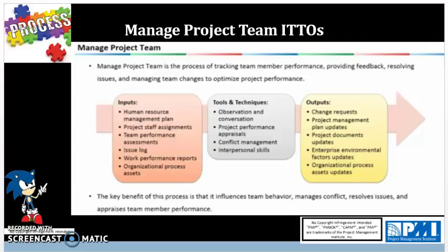So keep in mind that a risk that has not been escalated tends to become an issue. So when we identify risks in risk planning, we need to document them in the risk register and not gloss over risk planning, because if you don't document the risk in the initial phases of risk planning, you will have issues come up because these risks were not discussed. As a result, you have a lot of change requests, and some of those change requests do not get accepted and become rejected, resulting in an issue log. So that makes sense because we need to inform the project team where and when we do have rejected changes, and if so, what steps we take next to make sure that we can finish up the project on time.